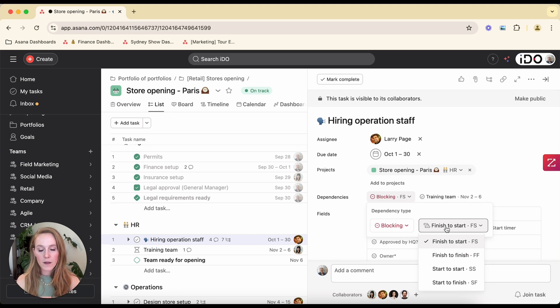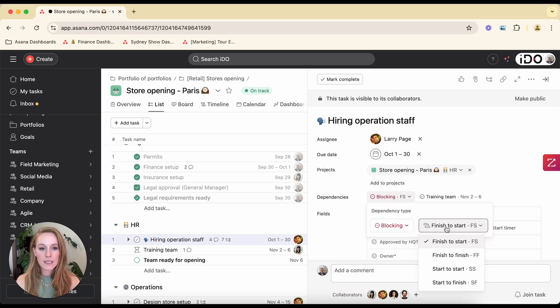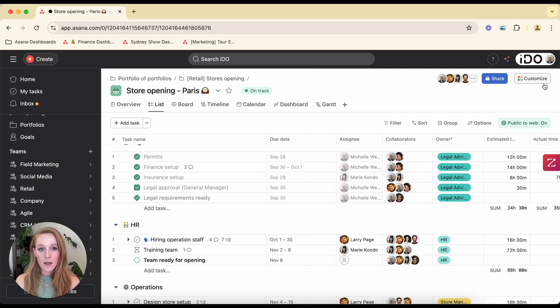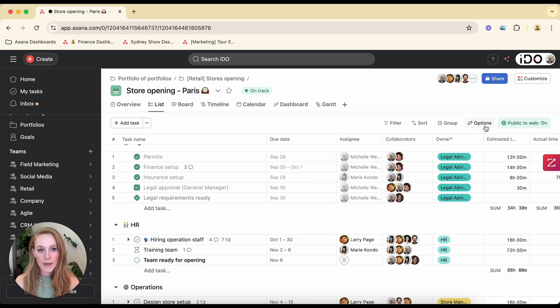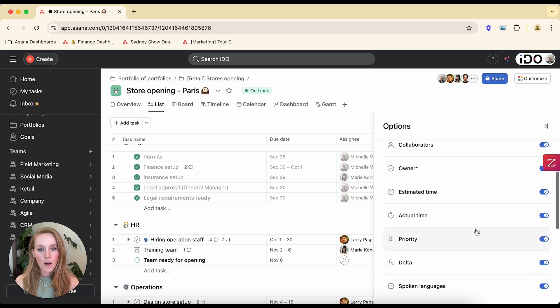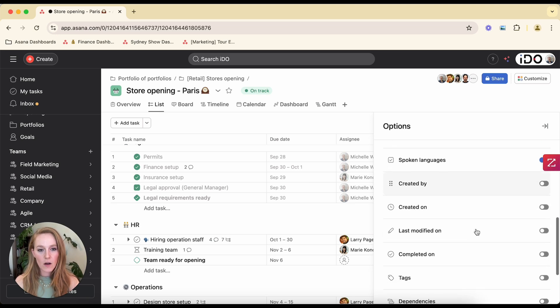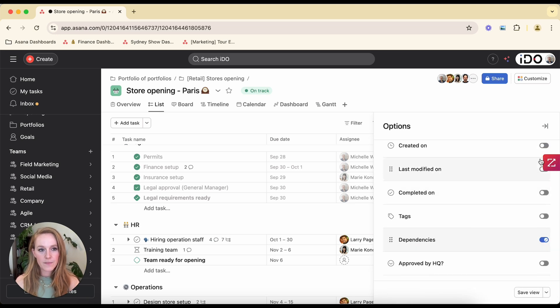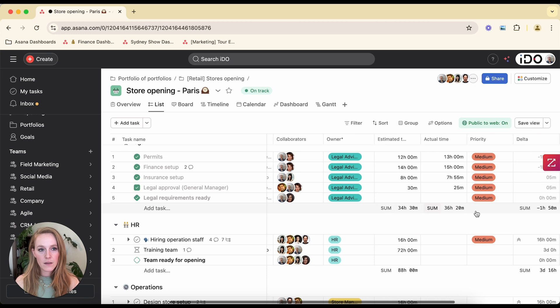So you have those four standard project management dependency types that you can toggle between if you need to get into that level of detail. You can then view these dependencies a couple of different ways. First, it's actually a column that you can toggle on for each of your projects. So if we toggle that on, we are going to see that here. So we can see it as a column.